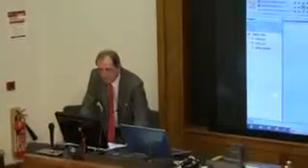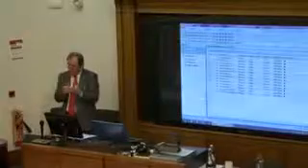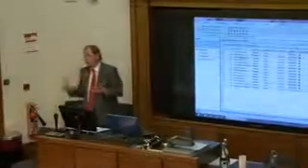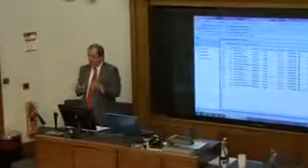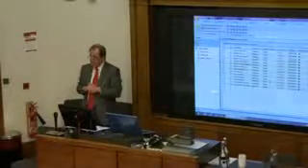If I click on this one here, it's come back in your cleansed schedule. It's showing you it's been a 2-day difference, and that's because the algorithm in Fuse is slightly different to the algorithm in Microsoft Project. When I suck this cleansed plan back into Microsoft Project and do a time analysis, those 2 days will disappear.